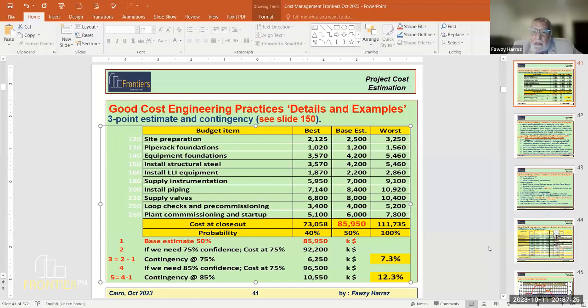No, it's not simple like that. I mean, the prices of this year, then 20% more is the price for next year. It could be less or could be more actually. And indeed, for these items, valves or pumps or whatever, we normally just pick the phone and call for a budget quotation from the vendor list.